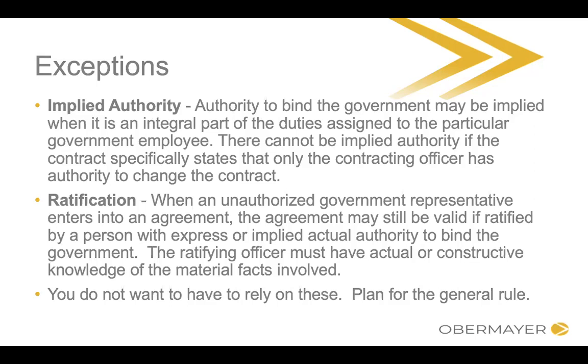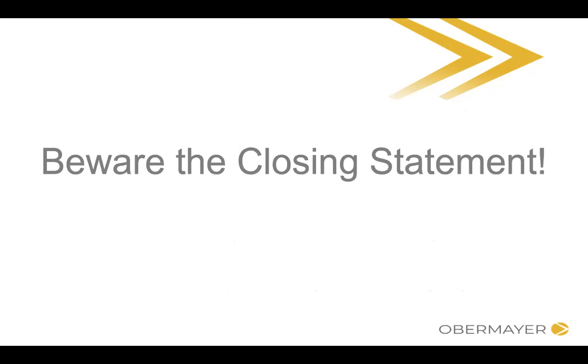If you don't have a letter, you never want to be like, oh yeah, I had a phone conversation with the contracting officer where they were like, do everything that my COR says. Because what happens is, if you file an REA, they'll deny it. If you file a claim, they'll deny it. 6 months or maybe not 6 years, but 6 months or 2 years into litigating and paying someone like me a whole lot of money to argue about it, you might ultimately be able to show, hey, look, the right person had authority and therefore I'm entitled to money. But wouldn't it be much easier if you were just able to attach a letter to your first thing showing that you did the right notice and got the right authority? You really never want to have to litigate these issues. It's a lot easier for you to get paid and to get an extension of the contract date if you just deal with it up front.